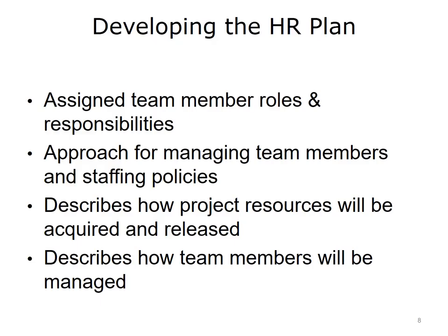TAP University continues: 'The Human Resource Plan contains the roles and responsibilities of those involved in the project, organization charts outlining reporting relationships specific to the project, and the staffing management plan. There is much information contained in the staffing management plan, including a description of how staff will be acquired and released, resource calendars, training needs, how safety and compliance issues will be addressed, and how rewards will be given to team members.' Resources for a healthcare IT project include doctors, nurses, clerical staff, departmental staff such as laboratory, radiology, pharmacy, occupational therapy, and administrative staff.